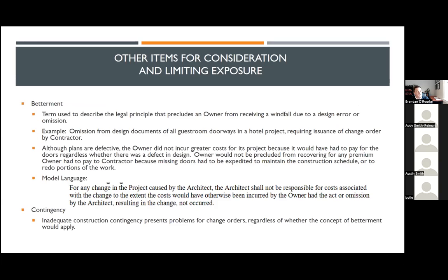Just by an oversight, it may seem out there, but it happens. As part of the damages, the owner is not entitled to recover from you the cost to purchase those doors. It would have been a cost borne by the owner, regardless of whether they were included or not in the design.